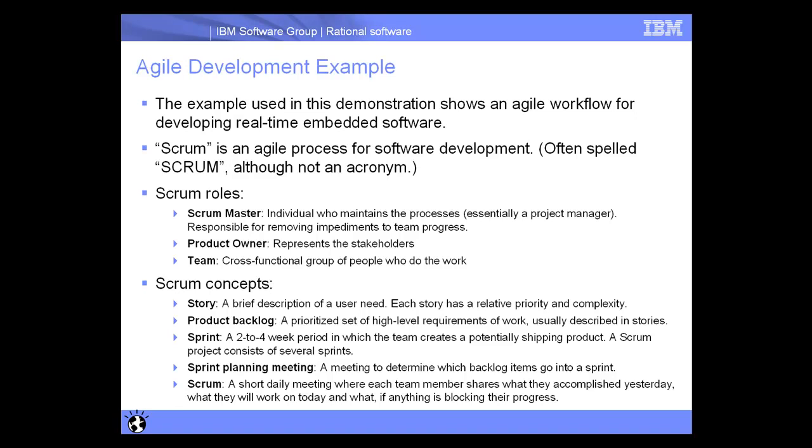Some concepts that we'll see are things such as Stories, which are brief descriptions of user needs with a priority and complexity. The team will also have a product backlog, a set of high-level requirements of work. In this case, the team has already done a couple iterations, or sprints. They are now on sprint number 3 and need to add a new feature to the application that they're working on.